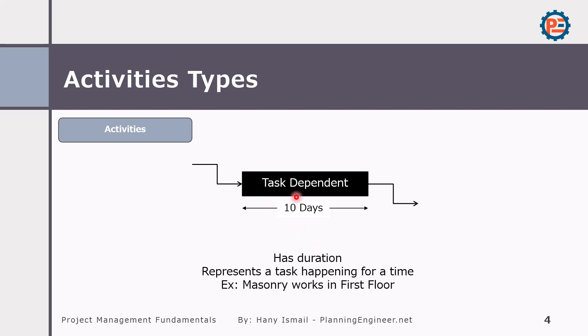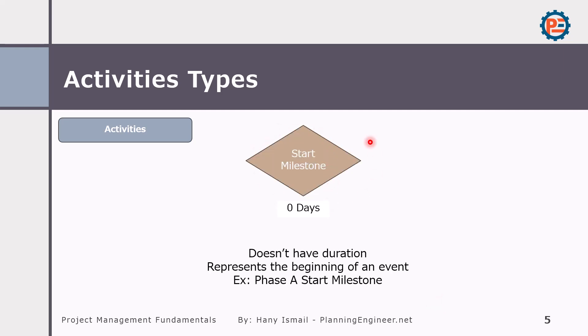The task dependent activity has duration and represents a task happening over a period of time. For example, masonry work on the first floor. This is the most used activity type in our time schedule. The start milestone does not have duration — it represents the beginning of an event. For example, Phase A start milestone or project start date. You can represent important dates using a start milestone.